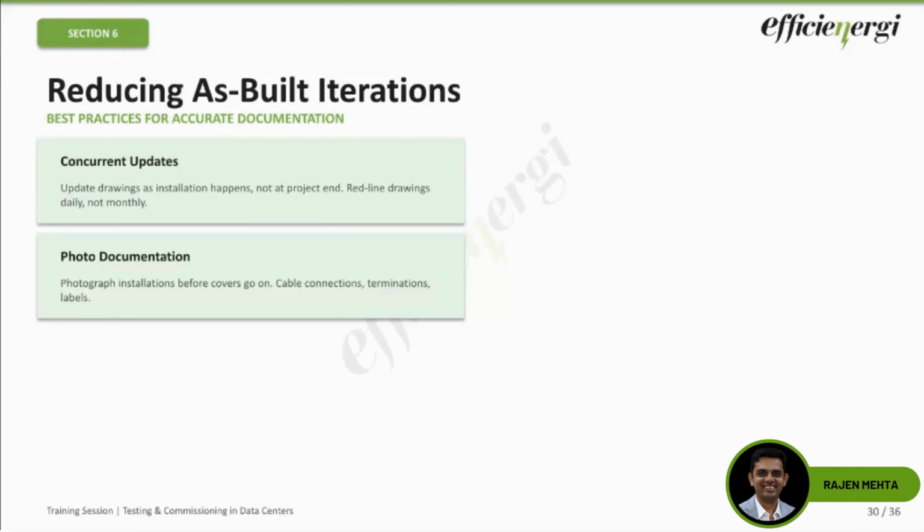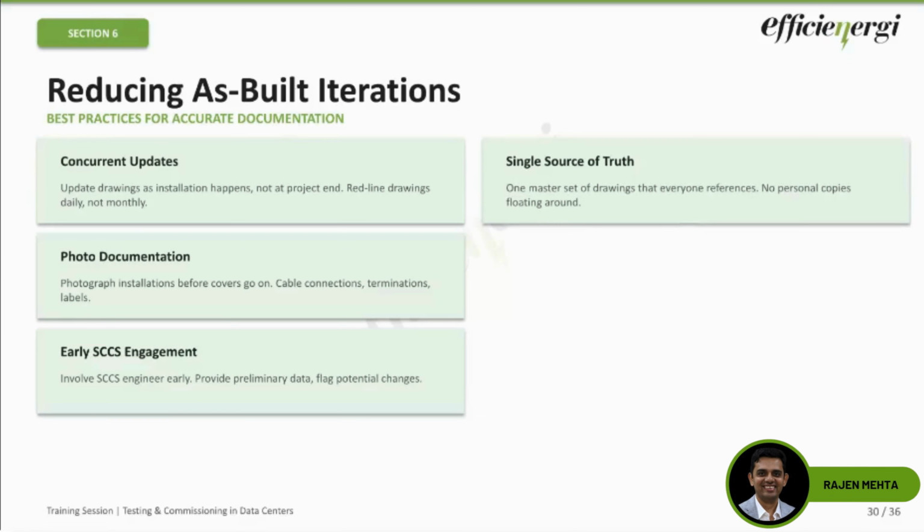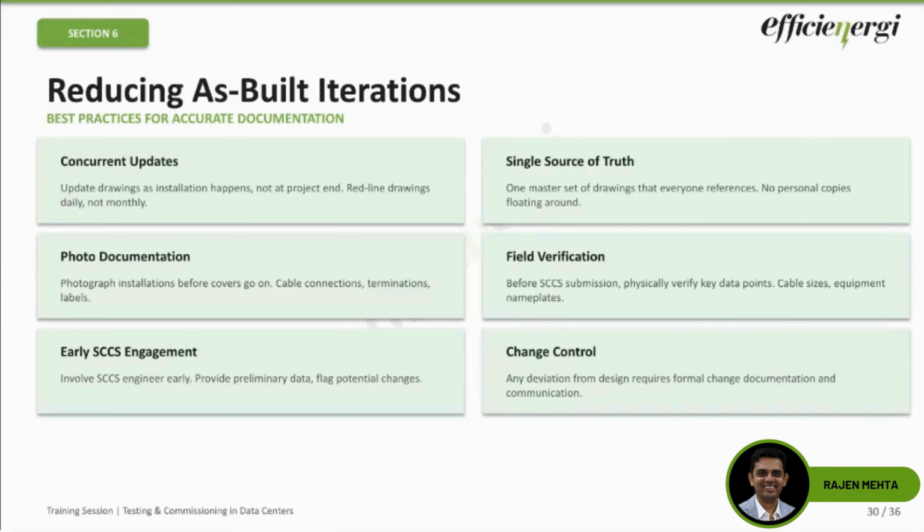That is very important. Early SCCS engagement, I already spoke about, ensure that we are doing engagement faster and earlier. Ensure that we are having a field verification. Whatever we are submitting, verify on the field. Before submitting SCCS data, verify on the field. Read the equipment nameplates and so on. And ensure that change control is managed. Every deviation, etc. is managed.